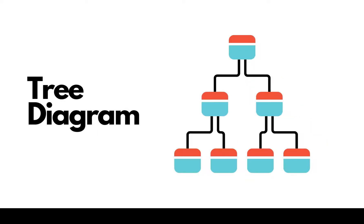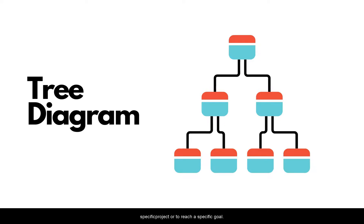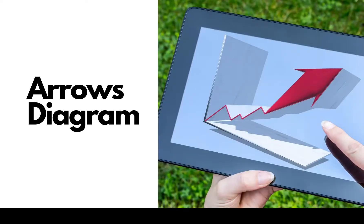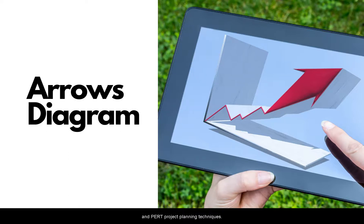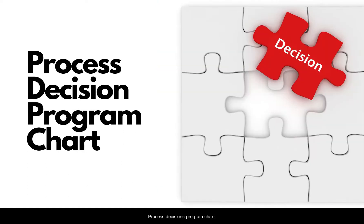Tree diagram: this maps out the paths and tasks that need to be accomplished to complete a specific project or to reach a specific goal. Arrow diagram: these have been used by construction planners for years in the form of CPM and PERT project planning techniques.